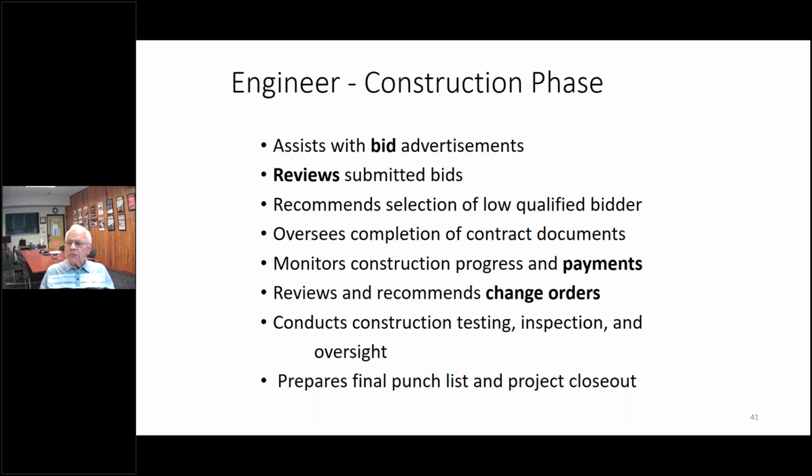So once money is actually available, then the construction phase begins. That bid ad is placed, the engineer and local attorney review the executed contract documents. Construction payments are generally due monthly. Change orders are to be expected, and generally there is a contingency budget item provided for such.